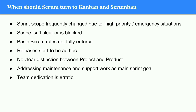Releases becoming ad hoc — you're just releasing whenever you feel like it from a development perspective — that's not Scrum. No clear distinctions between project and product, and conflict between the PO and the Scrum master. There's a reason those two people are members of the team — one coming from the business side, one on the project development side. Addressing maintenance and support work: given that these have different and changeable priorities, Scrum also won't work because it will affect the content of the sprint each time.